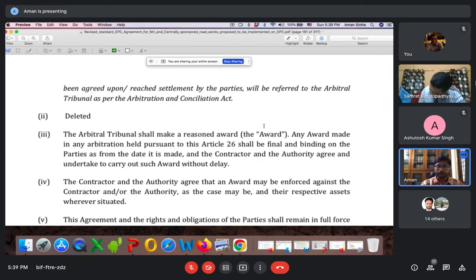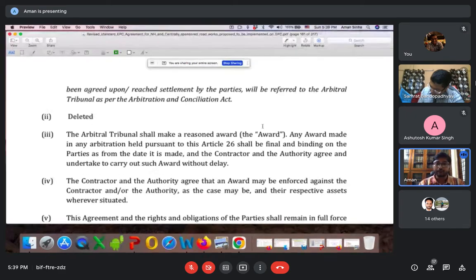Okay, and if you have gone through it and there is no amicable settlement happening, then you will be invoking arbitration in terms of Section 21 of the Arbitration and Conciliation Act, and in it you will be giving in brief what your claim is. You will also be nominating your arbitrator or giving a 3-member panel to choose from.